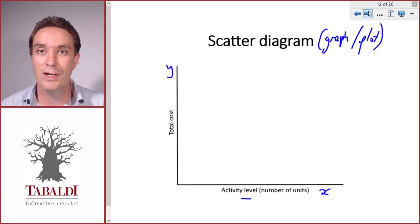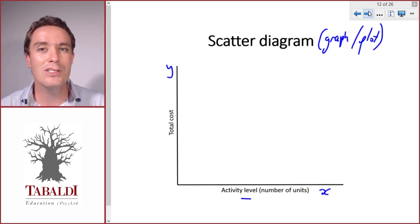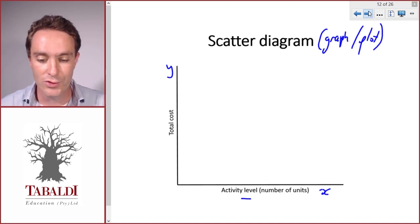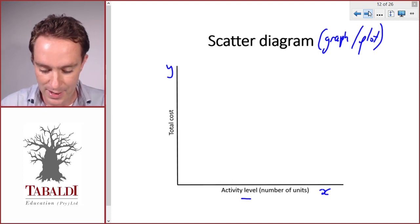So if we think the past information is a good indication of what's going to happen in the future, we can use that past information to estimate future costs. Obviously, if there's something we know that's going to change in the future that was not relevant in the past, we have to take that into account. For instance, if we know electricity is going to go up by 20%, we can't ignore that when we look at past information to estimate future information.